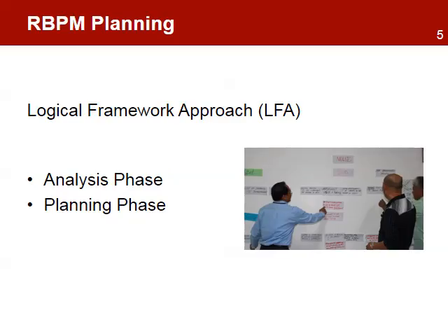Results-based project management will use the logical framework approach, LFA. The LFA is an effective management planning tool and a design methodology that provides a systematic process to structure the project information. It is used by most development organizations to help them analyze, design, and plan a project. The LFA consists of two phases, the analysis phase and the planning phase.